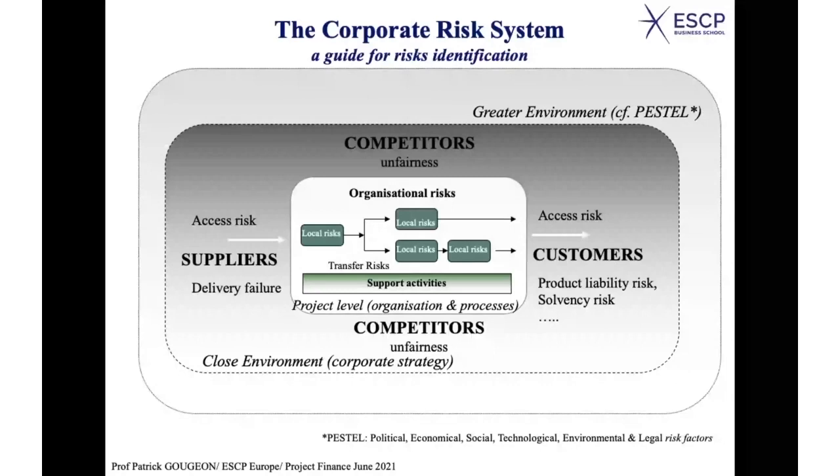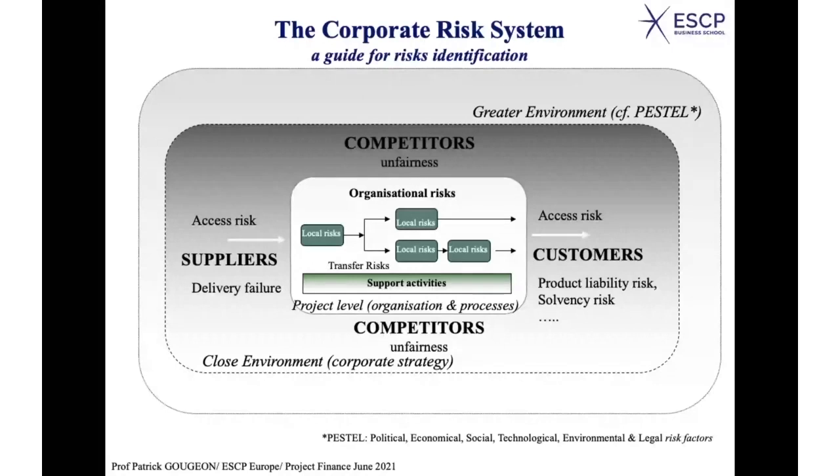Okay. Well, when it comes to the closed environment, you still have a certain level of control because you have some contracts with the suppliers and customers, on which you can impose some stipulations and so on. But it's a bit trickier because it's outside the company, so you have less control on it. Now, if you move further up to the greater environment, as I call it, well, what do you find there? You find all types of elements which are risk factors for which you have no or very little control.